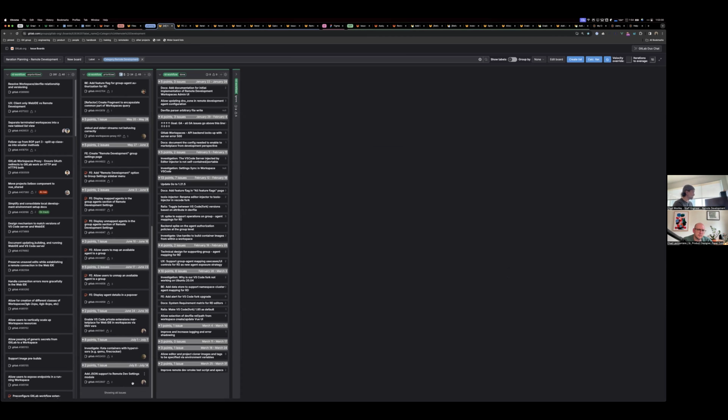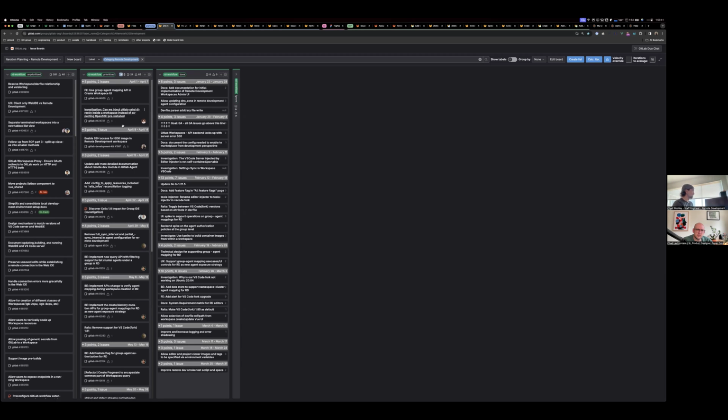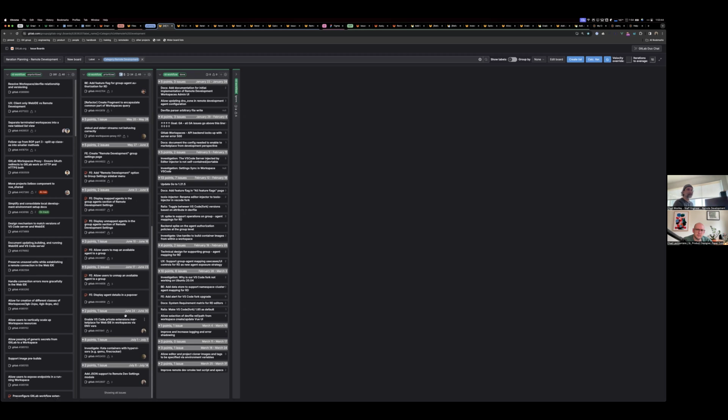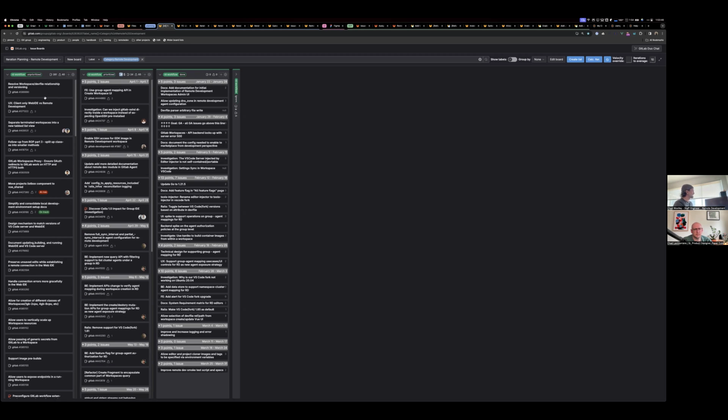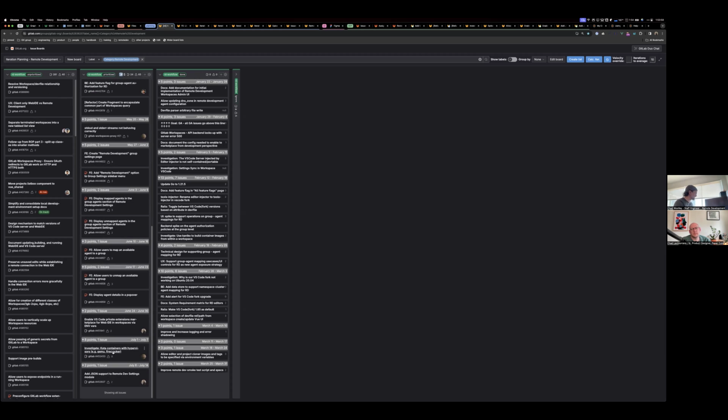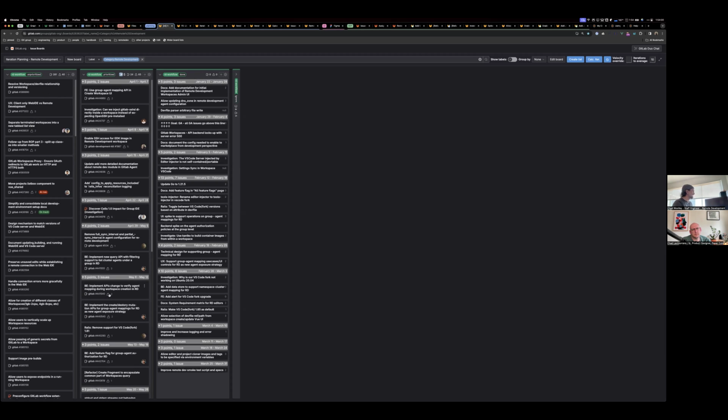And if we have that much filled up, it's like, okay, we can at least predict when anything within the next 1 to 3 iterations is going to be delivered. And we can know that we're not going to run out of work for people to do within that period of time. And so it's like a normal flow where weekly we're always figuring out, okay, everything that's in here that's tagged with the next 1 to 3 iterations, we're going to assign it for refinement. Once it's refined, then we'll prioritize it over here at the bottom and get the data that way.